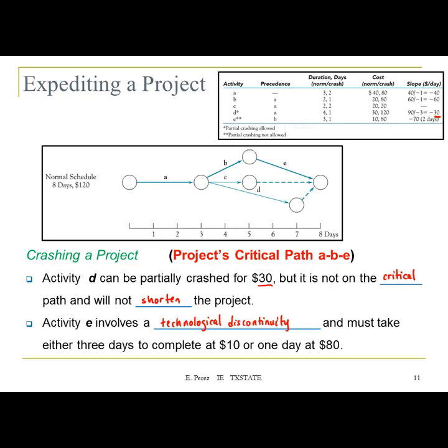I guess kind of what I'm asking is why you wouldn't just shorten it as much as possible. Well, you don't always need to shorten the project that much. It's going to cost you more at the end. So if the client wants you to cut the project by a couple of days, you would not push the project by 5 days because it's going to cost you more money. That will be the answer. Any other questions? But in the example, we're going to push the project up to the limit, which is going to be 4 days, okay?